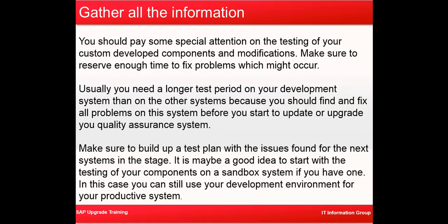You should pay special attention to the testing. Testing is one key component. It may take up to 4 to 6 weeks because you will be modifying the components and your applications. You need to validate whether the new custom code which you have adapted is working fine or not. So testing is one major area which requires a lot of effort.